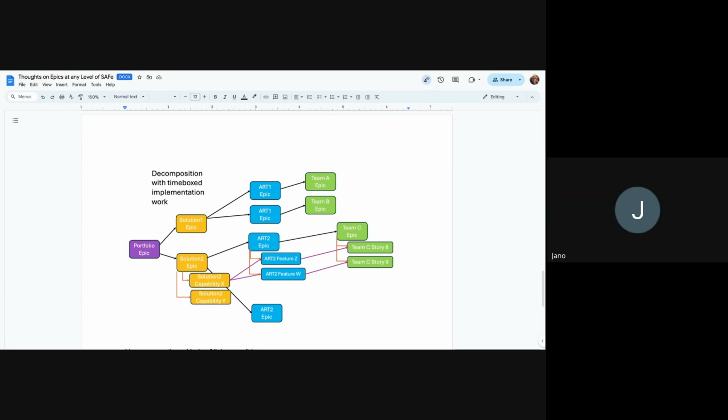No. I was just saying in Jira, you can set permissions per project, right? And if I had 2 hierarchy levels, for example, on the team level, that would make it easier for permissions just to be set for this specific team, rather than setting it for a team and also an art, because in the art there's also going to be other teams being part of that art. So we had this problem that we needed to set permissions on the team level and then also on the art level. This would maybe not eliminate this problem, but make it a little bit smaller, I'd say. Okay.